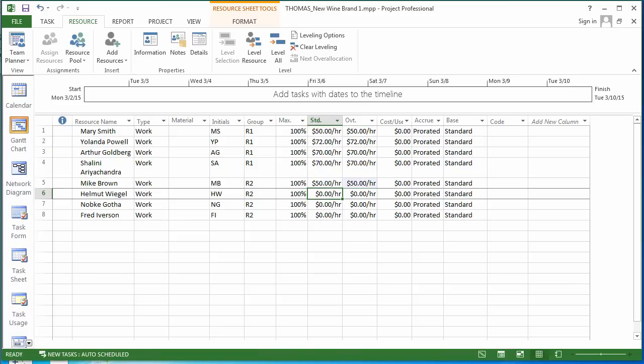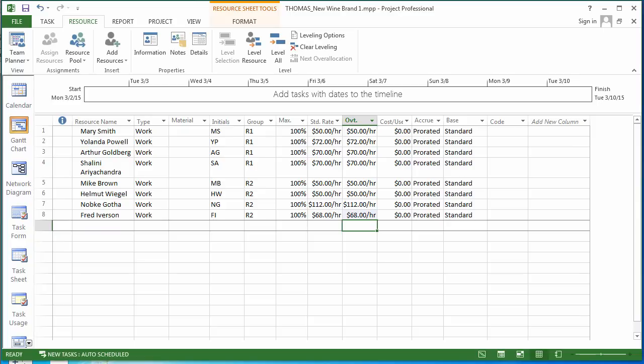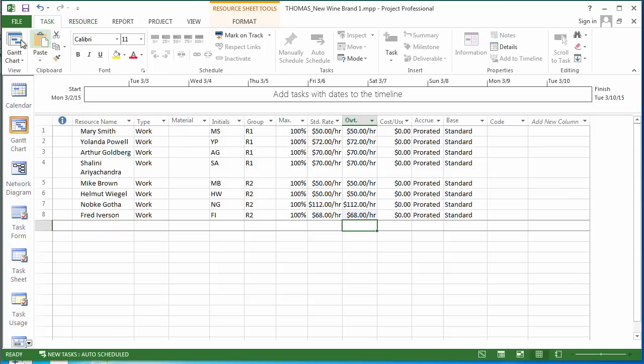If we did have overtime rates, we would put the overtime rate into this OVT column. Another thing we see is that our employees are only working 100% here, which means we don't allow overtime. Another thing we see is that they're not forced to work somewhere else, which would mean under 100%. Both are possible.